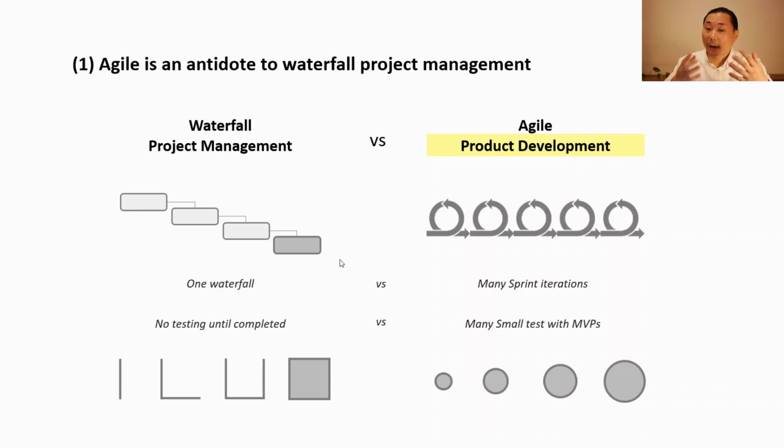We come up with a product hypothesis, build a minimum viable product to test the hypothesis, and learn if there's product market fit. If there is evidence of product market fit, great, we continue the development, i.e. persevere. If not, we pivot to another idea. And most typically, we learn good things and bad things about our MVP. So we keep the parts that work and improve on the shortcomings in the next iteration. So we tweak, persevere, pivot, or tweak, repeat. It's a much faster and cheaper way to fail.